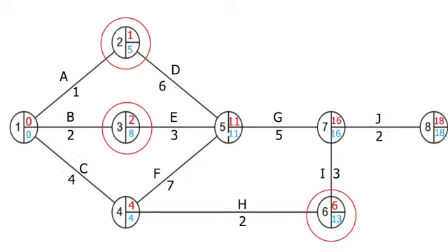Right, okay, so the critical path is the path which does not involve any slack. So there's no room for delay. So it's crucial that it's completed on time, as otherwise the whole project will be delayed. So what it'll be is C, it'll be F, it'll be G, and it'll be J. Now the nodes which I've circled are due to the slack, but also enable you to calculate the float time. So the float time, also known as slack time, is the amount of time that an activity in a project network can be delayed without affecting the overall project duration or the critical path.